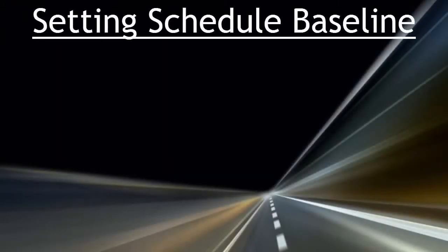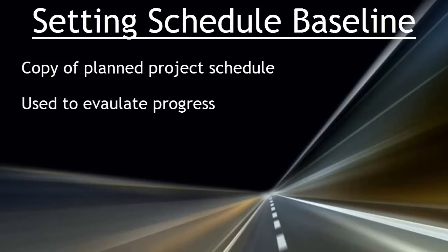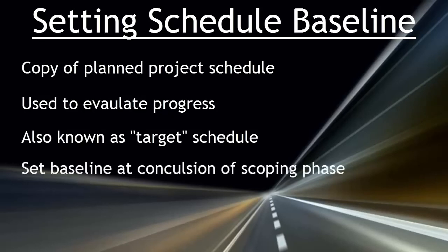Setting Schedule Baseline. A baseline is a copy of the planned project schedule that you can compare to the actual project schedule to evaluate progress. A project baseline could be called the target schedule. All project managers should set the baseline at the conclusion of the scoping phase.